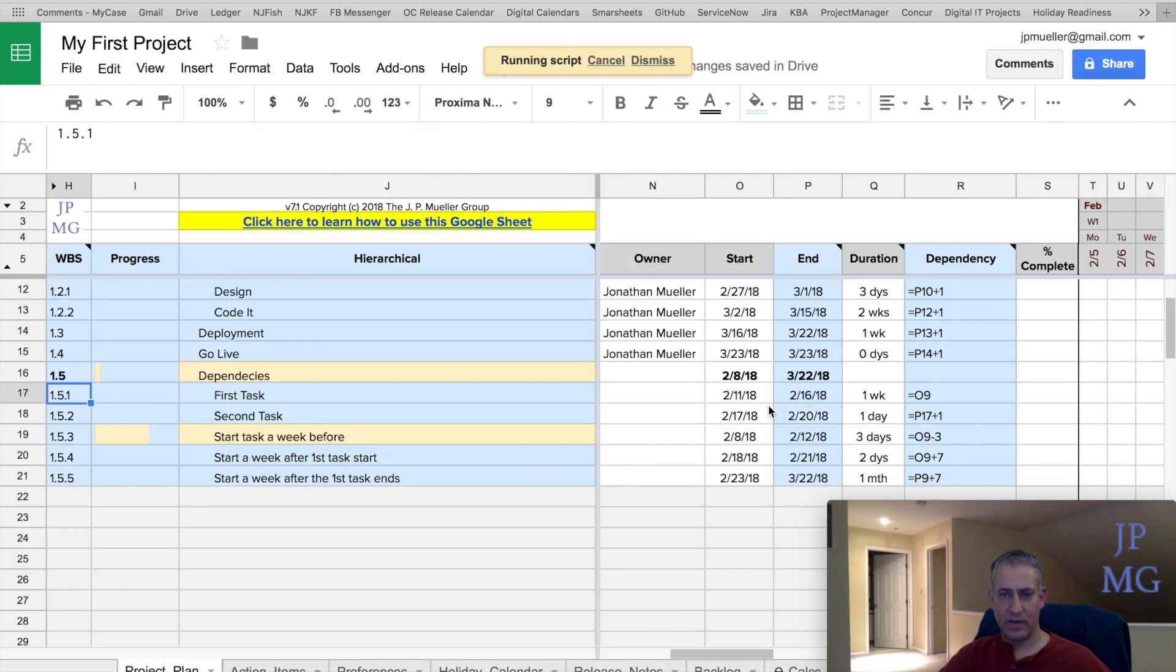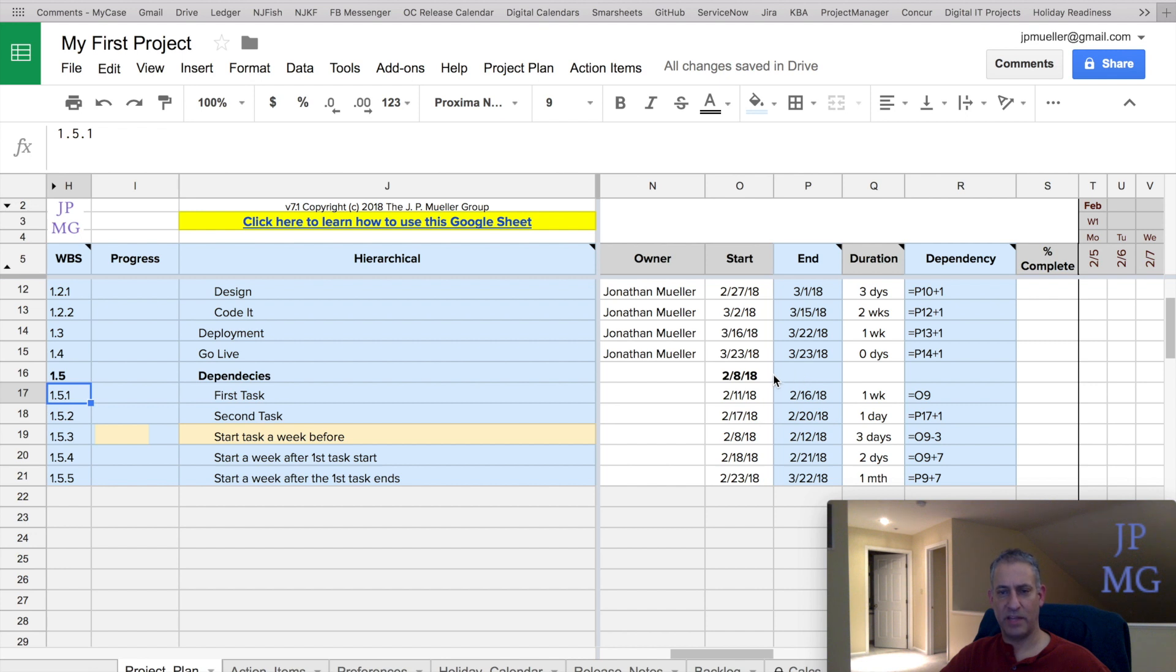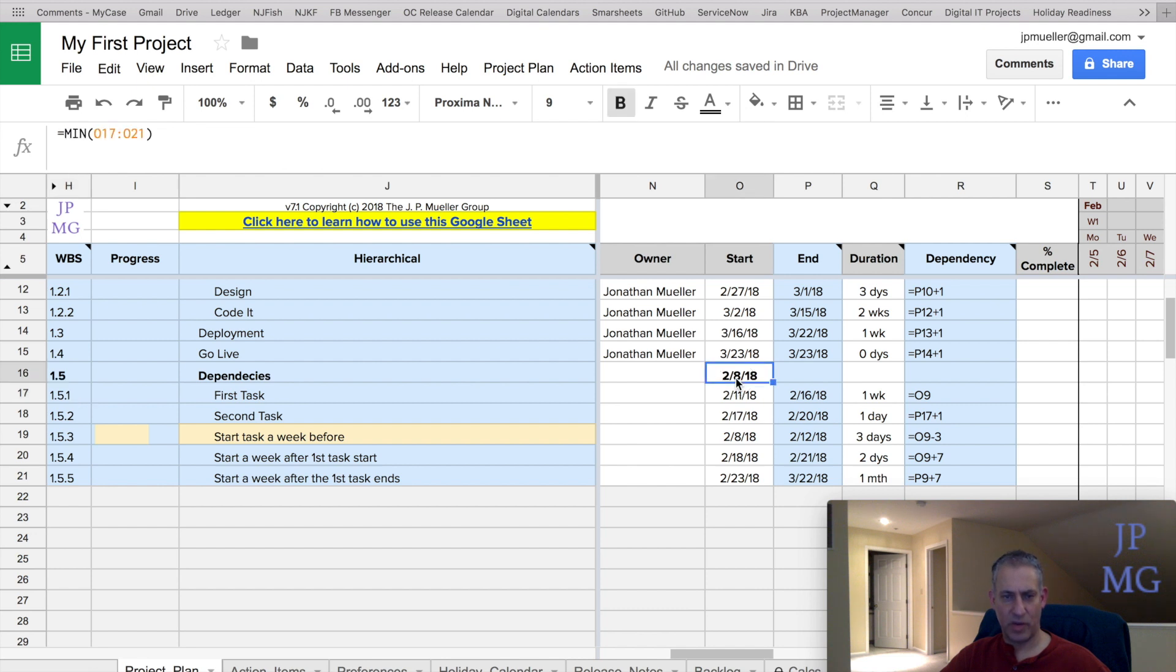I want to show you what happens if I did hit yes. What you're going to notice is that formula went away here in the end column. And that's what it was explaining to you. Again, you could go back to the script, how to enable scripts in the first video, and you'll learn more about that and the fixed formula function. But just beware that fixed formula will override everything in the end column if you choose yes when that dialog box comes up.